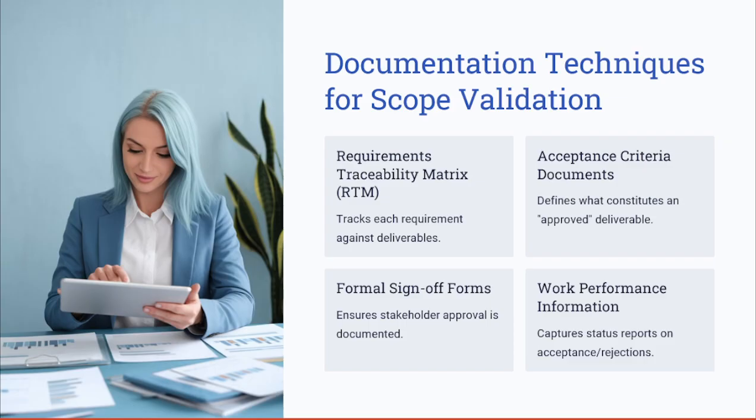Think of a checklist that a deliverable has to satisfy, for example five acceptance criteria. For an office building, it needs to be finished on time, painted white, and furnished. All of these can be considered acceptance criteria for verifying the deliverables.